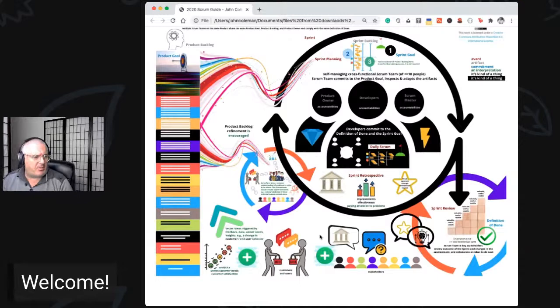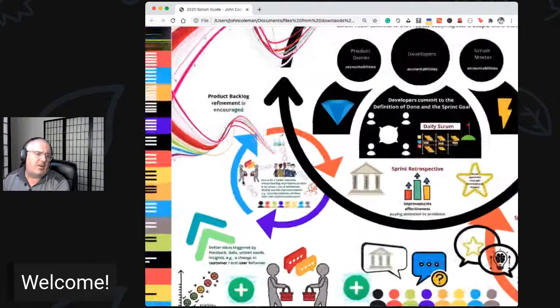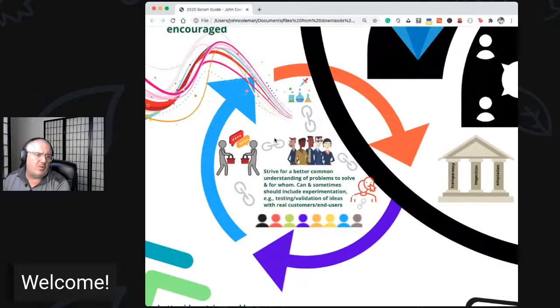As well as getting feedback from stakeholders not just at the sprint review but at other times — hopefully talking to customers, seeing if this changes customer behavior, looking at analytics. I like what Marty Cagan says: a good product manager/product owner would be looking at analytics maybe one to one-and-a-half hours a day. The other big thing I noticed is that product backlog refinement is now more strongly encouraged — they removed the mention of the 10% cap.